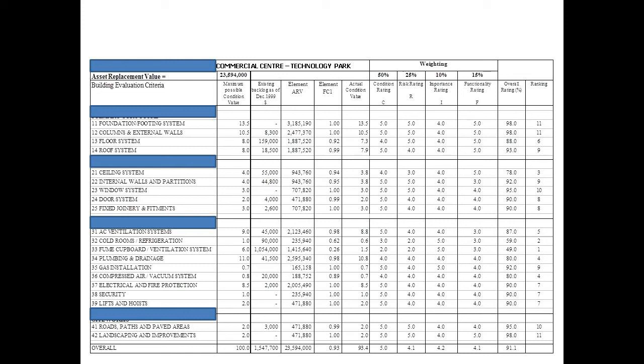That's an intelligent way of saying, well, functionality is important, but really the importance rating of the building and functionality, it's only 10 or 15% each. The condition and the risk, well, they need to be 25% or higher. So that's another important issue to consider when you're looking at your strategic requirements of the business. That also will then reflect on what we need to consider as important in the audit to push those numbers and push that data through in the report.